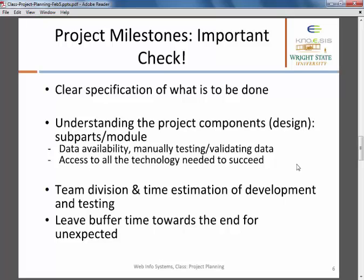Understanding each of those pieces is very important. You also need access to all the technologies you are going to utilize. Then comes time estimation — you need to estimate how much time you'll spend developing each module. If you have a team, you need to coordinate, divide the work, and estimate time for developing and testing each module. Keep certain buffer time towards the end for unexpected circumstances. Starting the report template early keeps you on track.